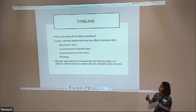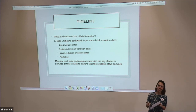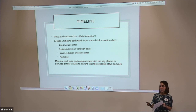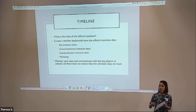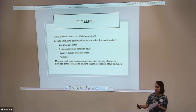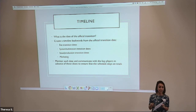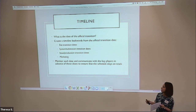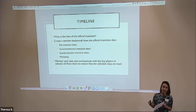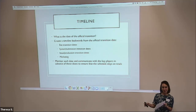I would highly recommend that once you get those dates nailed down, you monitor each date — don't just let them pass by. Proactively communicate with each key player to say, okay, the date of this site transition is coming up. Do we have everything in place? What haven't we thought about? Who's responsible for each piece of this puzzle? Make sure you're keeping an eye on those dates and that everything that needs to happen around them is happening.